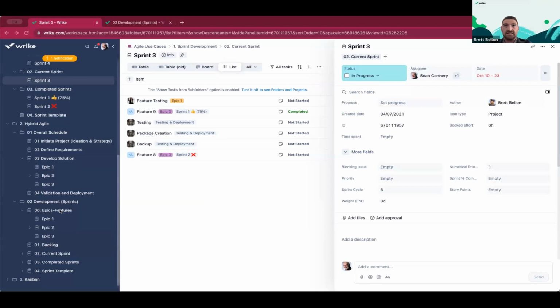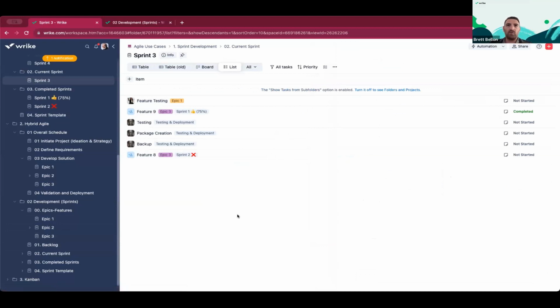I've seen it done where teams don't even do a retrospective the same way as we used to. We had a sprint review and into a retrospective, and the review was more focused on what actually happened in those 2 weeks, the retrospective on what went right, what went wrong, what can we improve. I'm finding teams moving away from that generally, and more so they just merge those 2 meetings. Either way, the concepts are sort of the same.